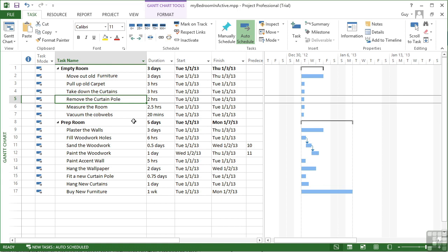So that's an option, sort of alternative to deleting the task. It's a task that you might not be sure you're going to carry out, but you might do. So you currently inactivate it, you make it inactive. It has no say in the current project plan, but still sits there should you need to bring it back and reuse it.